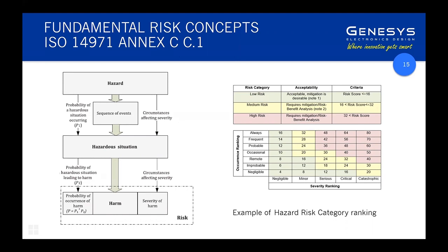A good example is surgery. If you have a problem that causes the duration of anesthesia to be extended, that may or may not harm the patient. Some patients may have no effect, other patients may suffer nausea. So just because a hazardous situation occurs, you don't necessarily know that it's going to cause harm. So at the end of the day, those two probabilities contribute to a net probability that the hazardous situation occurs and does actually cause harm.